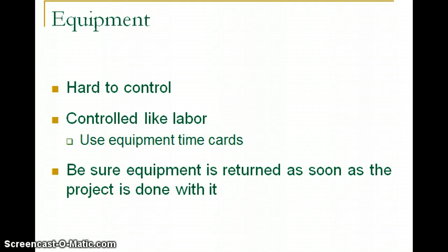The amount of time that the equipment is assigned to a particular job is also monitored, and the equipment manager or project manager may be responsible to complete those time cards out in the field, depending on what kind of equipment they use for a given time frame, and then that information is sent to the accounting department for data entry so that they can determine the overall costs of the equipment for that particular job.